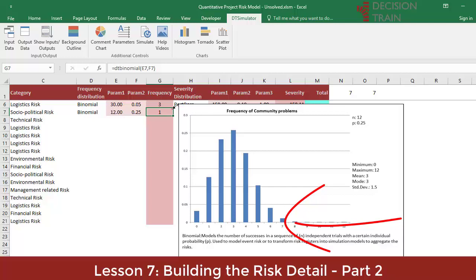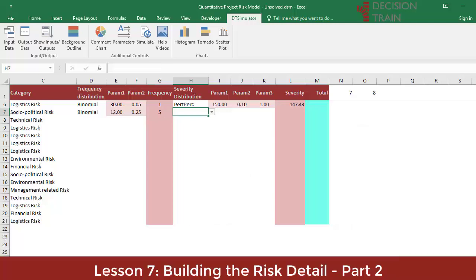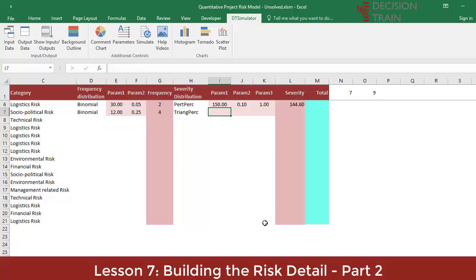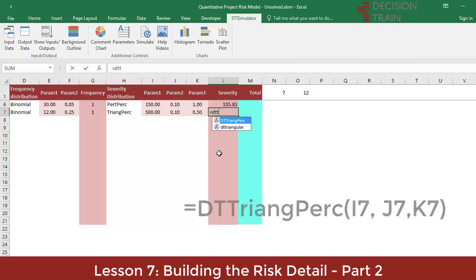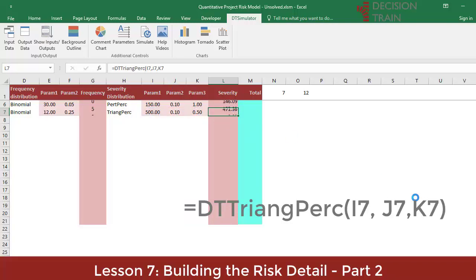Generating 7 events or more would barely add up to 1% probability. Let's model the severity of this risk with a triangular PERC. This is the same as the triangular distribution, but the minimum and maximum parameters are expressed as percentage differences with respect to the most probable value or mode. Write 500 as your first parameter in I7 — this is the most likely value. Then in the two adjoining cells type 0.10 and 0.50. This means a minimum value of 500 minus 10%, that is 450, and a maximum value of 750 — 500 plus 50%.